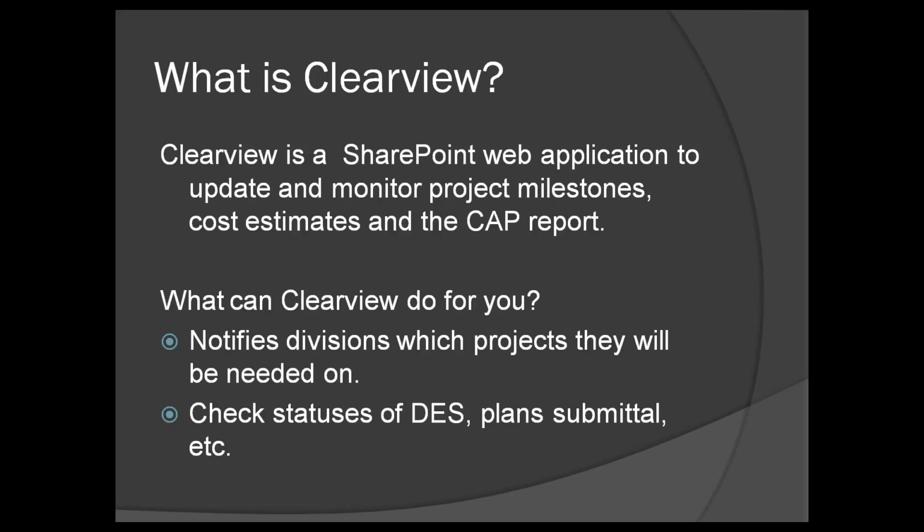The subject matter experts, such as traffic, can input into the system when they have completed it to alert you of this as well. Is an advanced situation folder needed? Input this into the advanced situation milestone in Clearview so that structures and drainage are aware they need to be tracking this folder. This will help them be aware they will be needing to review and they can prioritize their work.